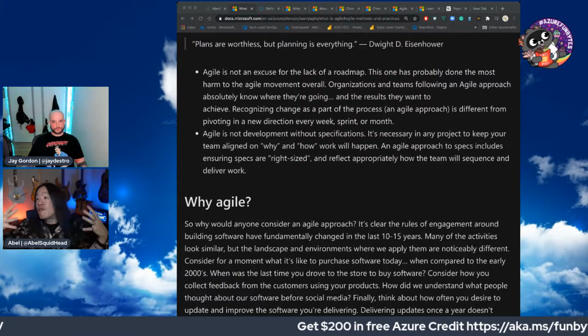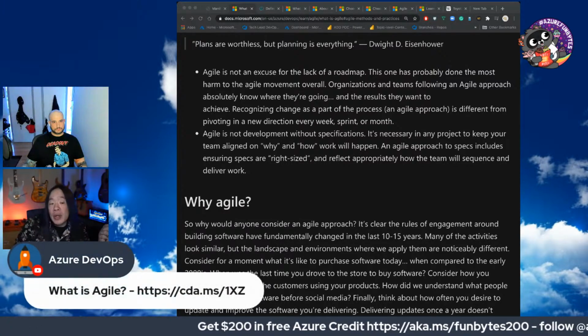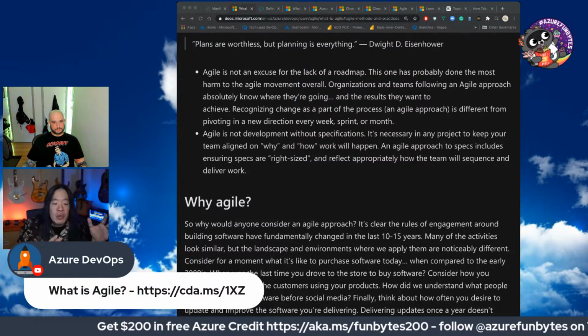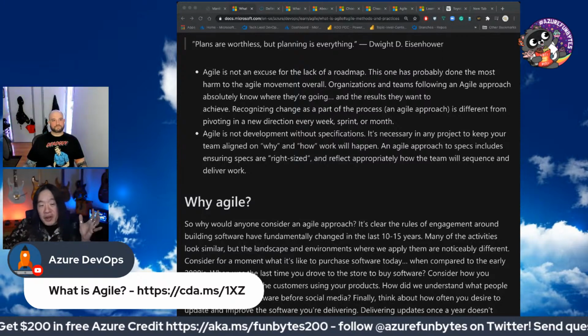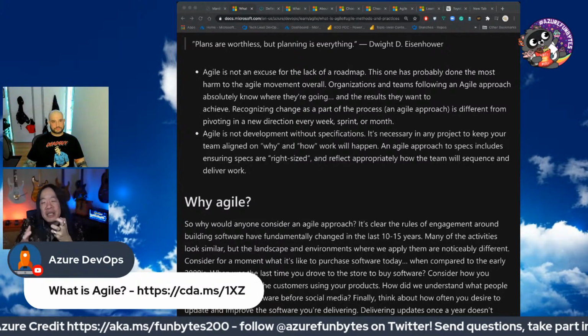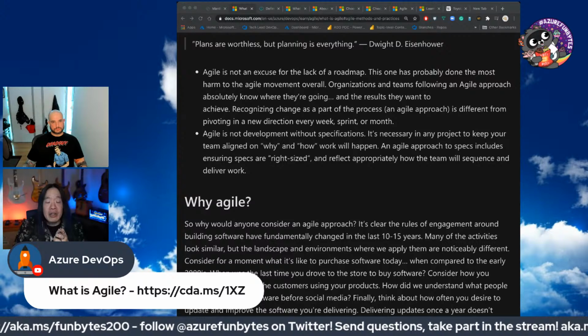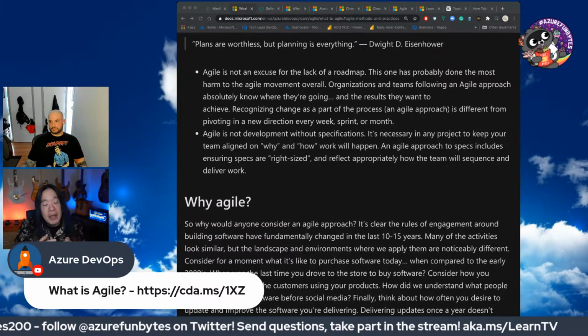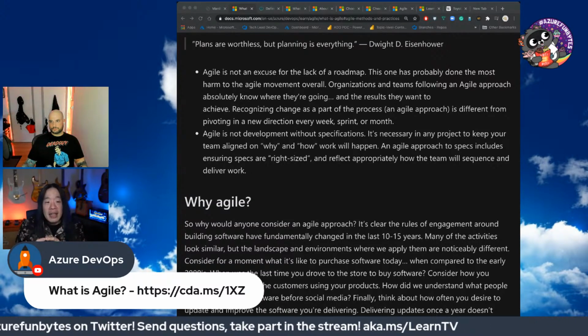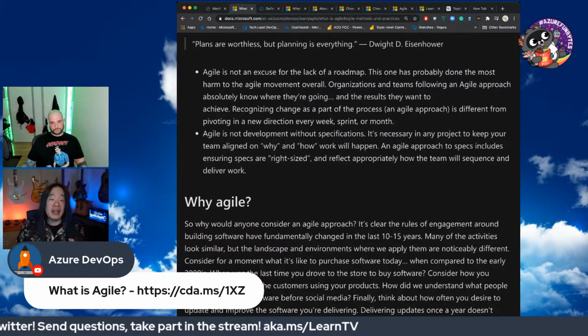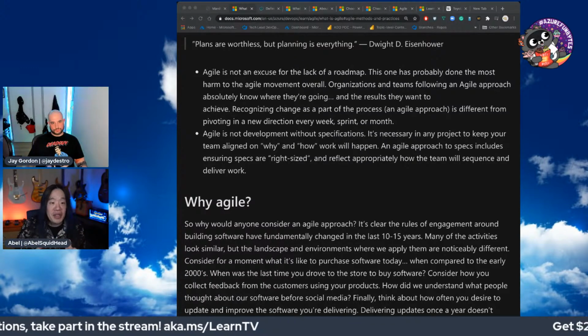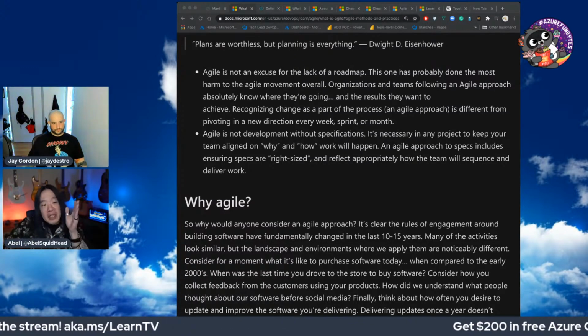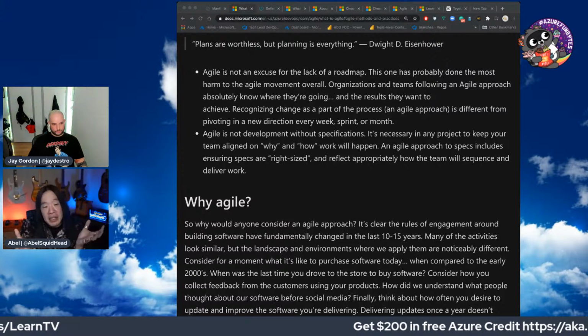It can be 4 weeks, it can be 3 weeks, 2 weeks, all the way down to a week. So somewhere usually between 1 week to 4 weeks. Anything more than 4 weeks, the iteration is just a little too long, and you don't get that feedback to be able to course correct well. Anything shorter than a week, oh my goodness, you're just not going to be able to get enough things done, right? So it needs to be somewhere in between there, and it just needs to make sense for your team.